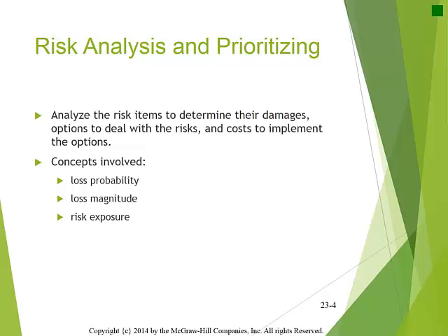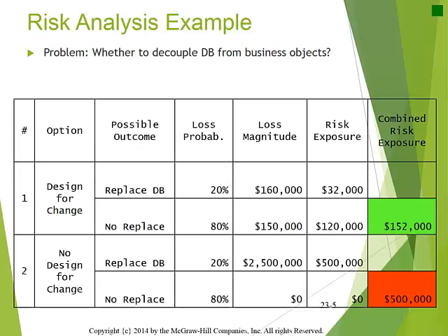Tools to evaluate risk are decision trees and decision tables, which are equivalent tools. For each risk, a decision table or decision tree could be used to analyze options to lessen the risk. A corresponding decision table or decision tree should be created to analyze each risk. Rows of a decision table correspond to branches in a decision tree.